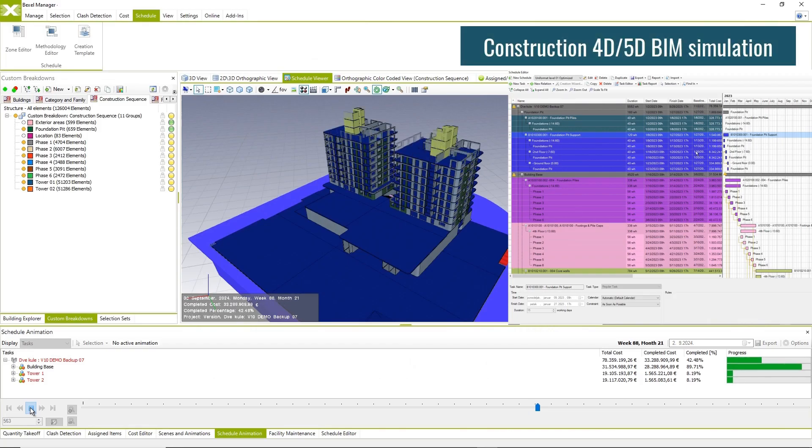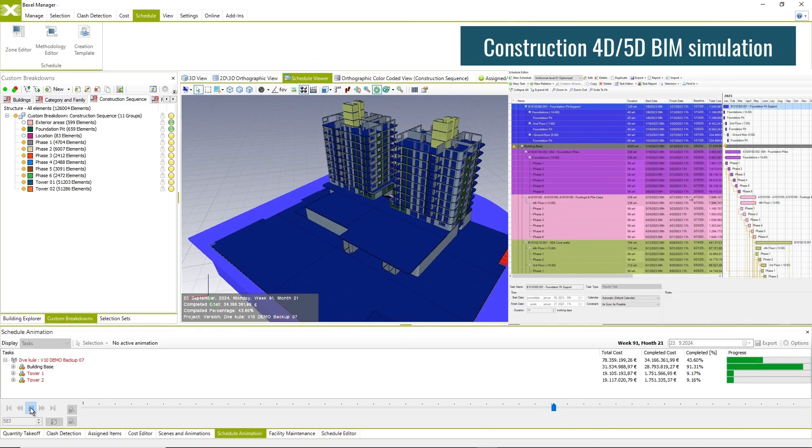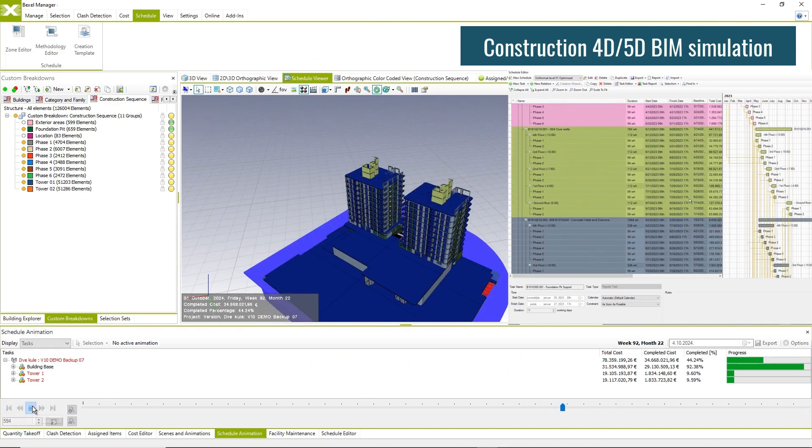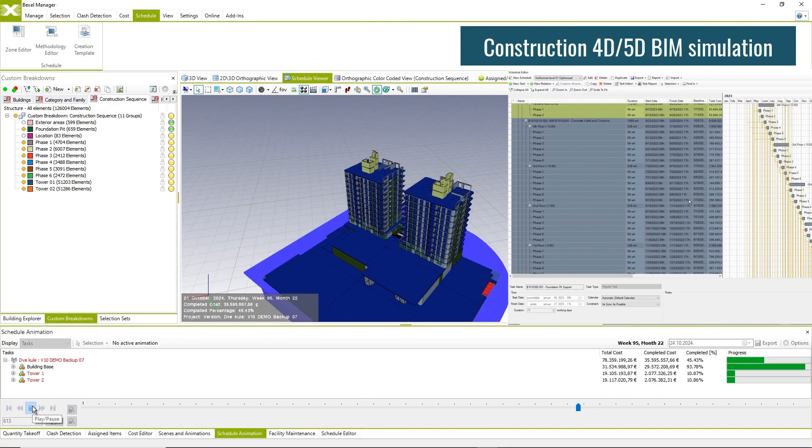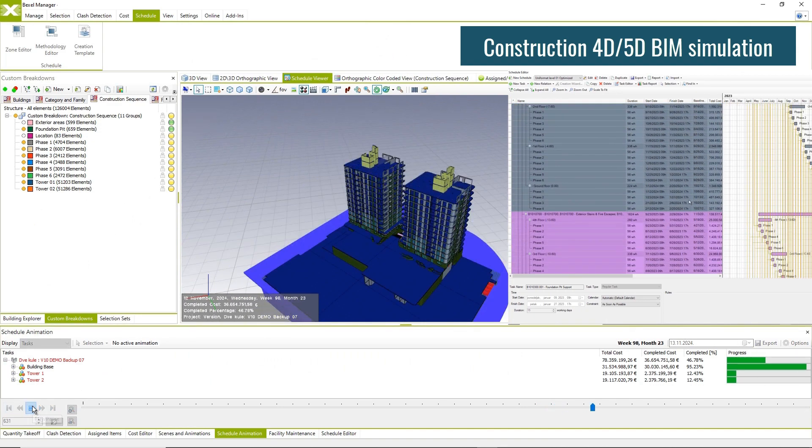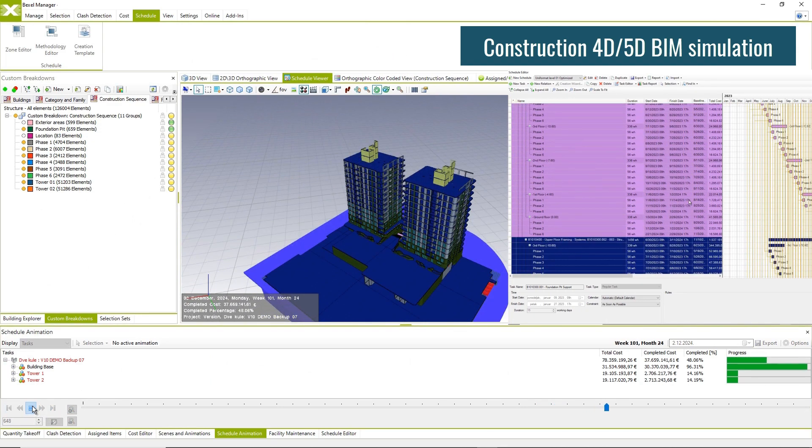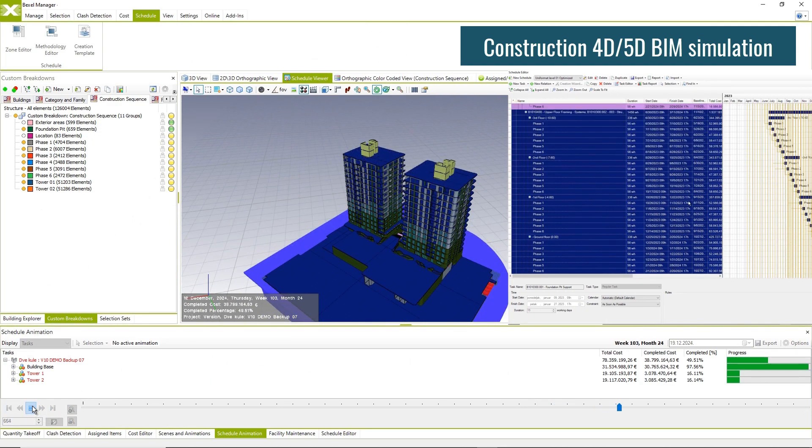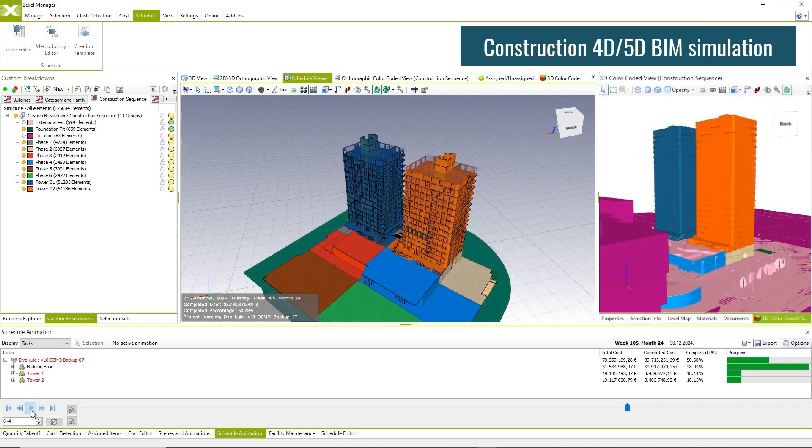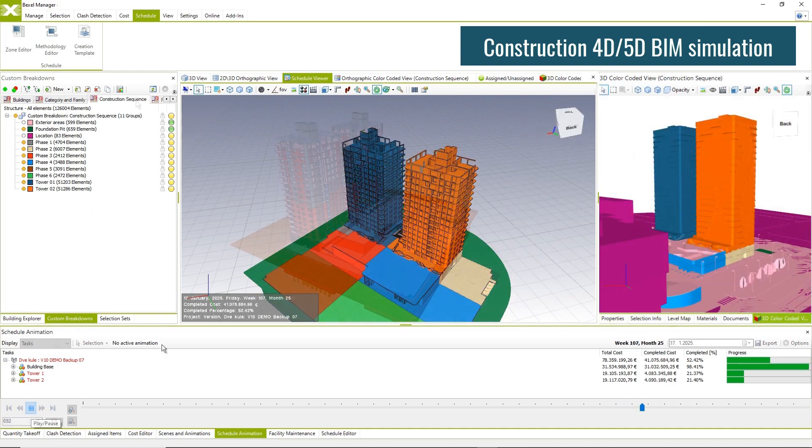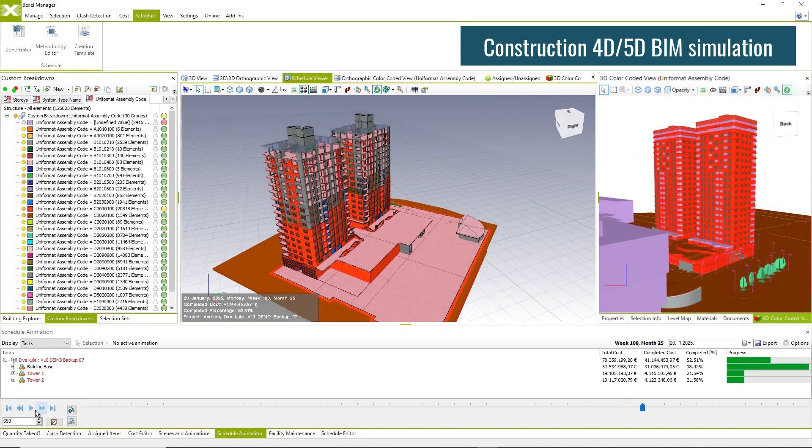Play 4D or 5D simulation and visually verify the construction schedule. Colorize BIM elements by actual task colors or color-coded rules.